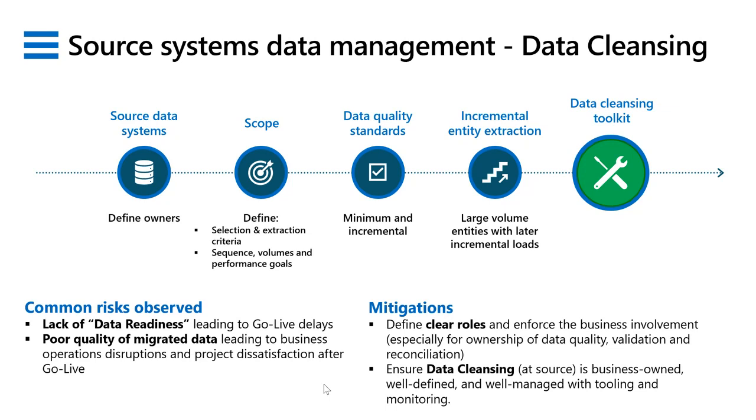So in the source data management, data cleansing is probably the most important thing that we wanted to highlight. And a couple of very common risks that we observe. Number one is lack of data readiness delaying go lives. I suspect if we did an analysis across multiple different projects, lack of data readiness will be pretty much at the top of the reasons for delays to go live.